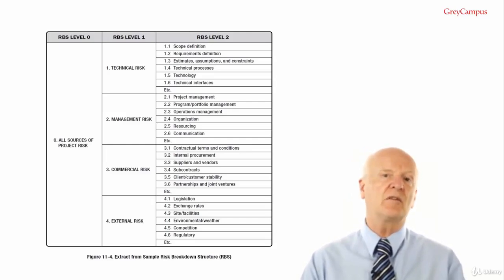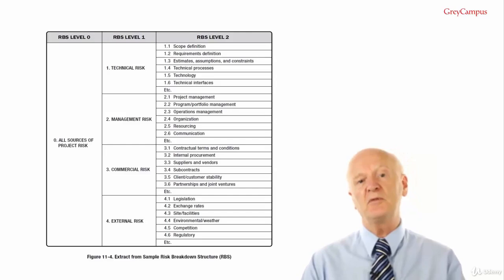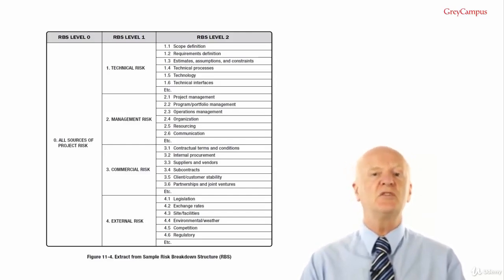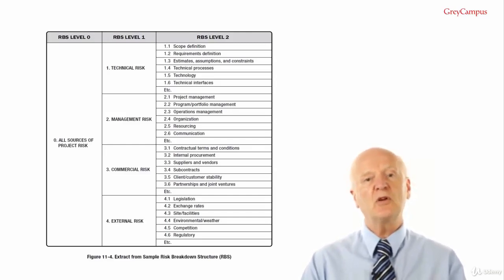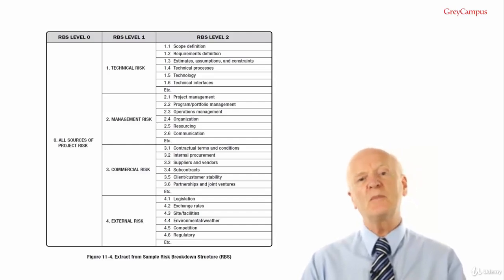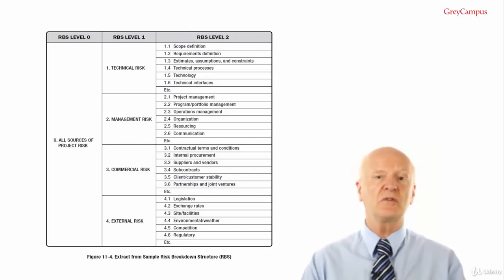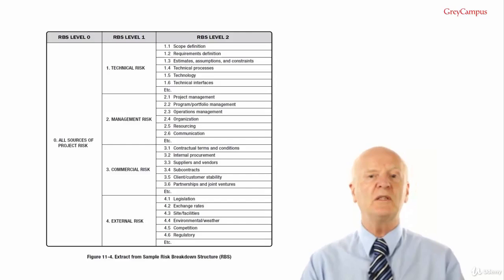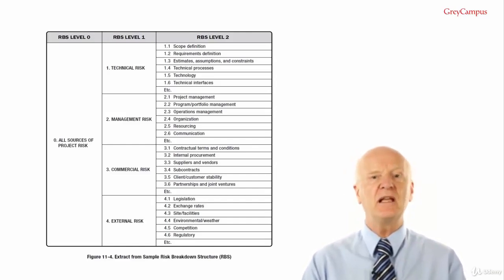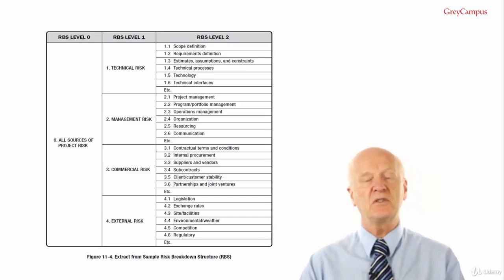The actual risk categories will depend upon the project and the project environment. The PMBOK is not prescriptive and figure 4.11 is just a suggestion. You will record the risk categories in the risk management plan. Risk can also be categorized by common root causes. Dealing with individual risks can be time consuming, but when grouped into categories it's much more efficient because you're focusing on groups of related risks and then applying generic style risk responses.